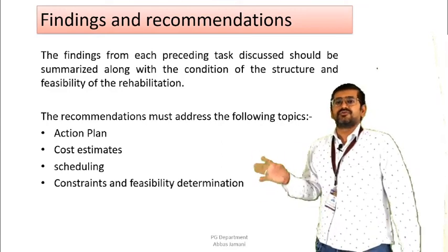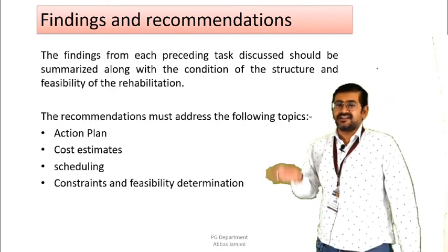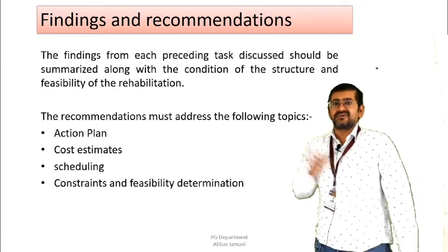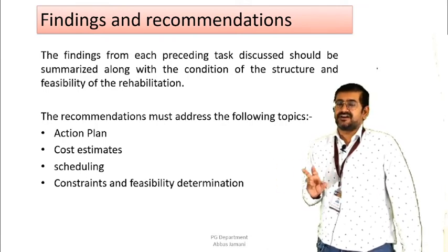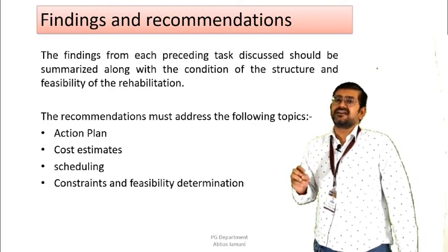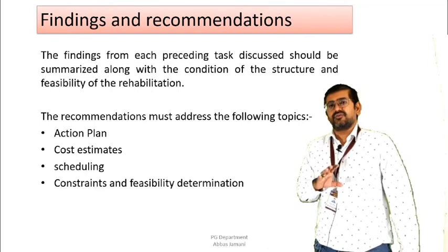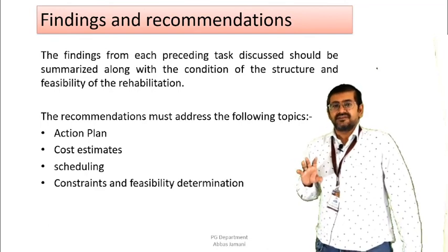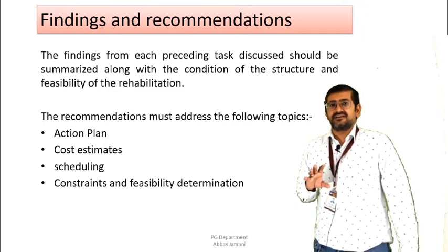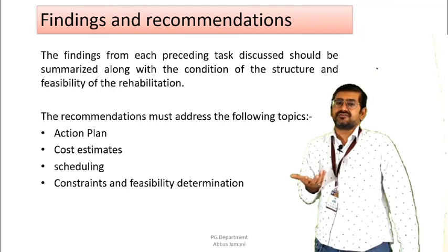That is, when you are going to do this particular activity, are there any site constraints? Are there any cost constraints? Are there any labor constraints? Or are there any material constraints? That needs to be sorted out, discussed and clearly conveyed to the client in the report itself, right? So there is no scope for any hidden aspect in that. The more clarity that you provide to the client, the better the result of the investigation is going to be, right?